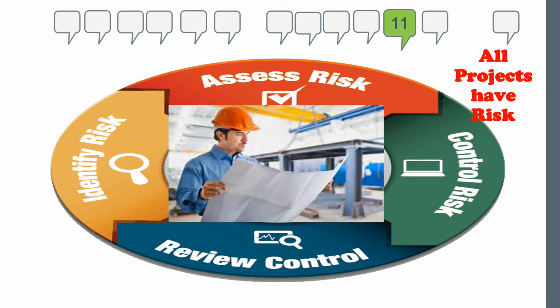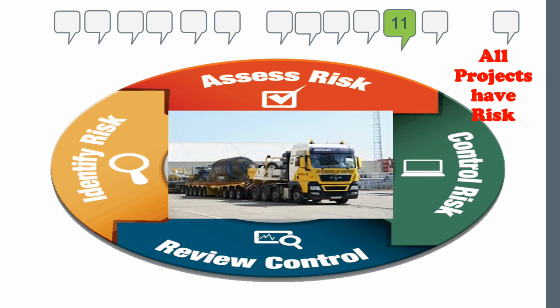Next risk is the renovations of that. Maybe we don't get the renovations done. Maybe the back door doesn't get fixed in time for us to move in equipment and things like that. Again, we have the same thing. We'll make sure we have a solid contractor with a good reputation of doing things on time. We will maybe even offer some bonuses. Again, getting back to every week we're delayed, $5,000, we could offer some bonuses to do that. The other thing is the equipment's coming up. It's coming in the wintertime or almost the winter time, so there could be some accidents that happen in that, so we have to have a contingency of how we move that, when we move it, why we move it.